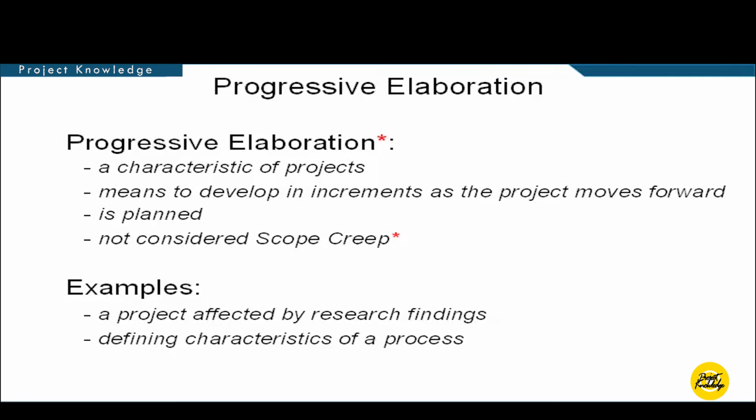In other cases, the project must be further elaborated as the defining characteristics of a project are defined, which would lead up to the defining process itself. Similar to the first, you may also encounter projects that rely on testing results. For example, if a project involved detoxifying the soil on a 1-acre property, and the soil testing results would determine the detoxification process, then those results would determine how the project would move forward.